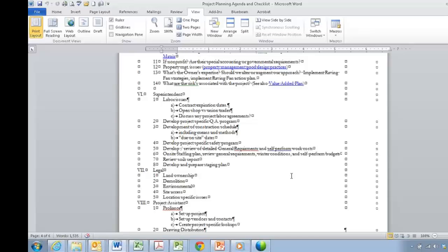Now, this is where we talk about schedule. You said development of a construction schedule. This is the however many page, however many hundred or thousand line item schedule that is truly the detailed effort prepared and owned by the superintendent, and making sure how that relates back to the overall schedule that does more of the tracking of the design and the city entitlement process on a more global basis. Coordinating those two together is very, very important. A project-specific safety plan, you can't start that soon enough because as you do your procurement, it's great to include that in your procurement and buyout efforts.